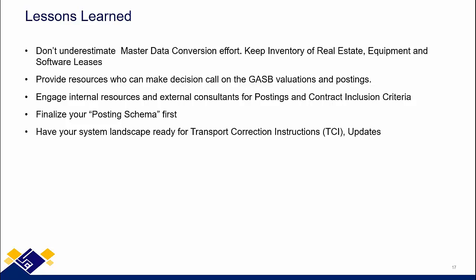It has been a big task for us to get the inventory of all the real estate, equipment, and software leases. They are all over the place. Some of them are in legacy systems, some are in Excel spreadsheets. Some things are in the brains of the people also. So it's going to take a lot of time to get the inventory of all the leases that we have.